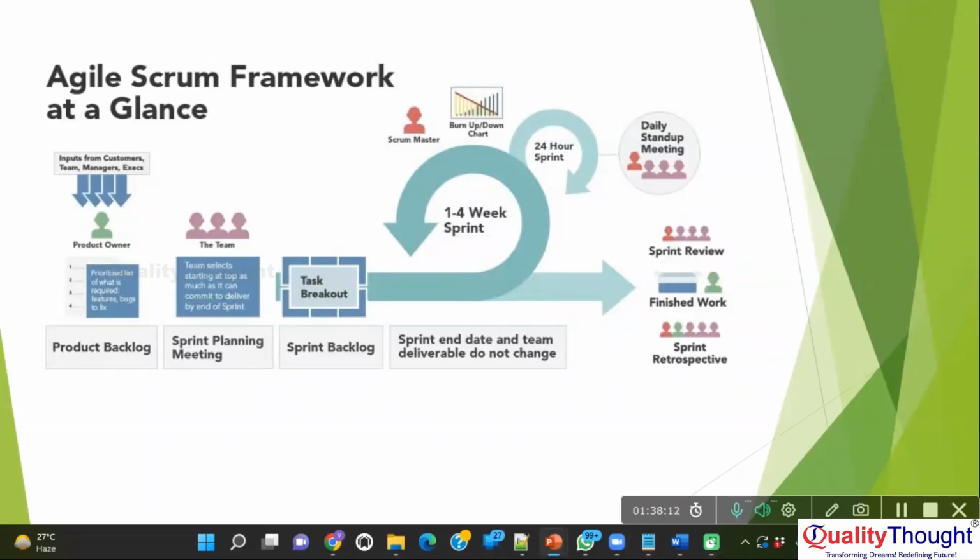Can you think and tell me what the sprint contains? What happens in the sprint planning meeting? Discussion for the backlogs. So this meeting generally happens at the beginning of the sprint. Generally, this meeting would be for 1 or 2 hours, not more than that. Basically, the purpose of the sprint planning meeting is what requirements we have to pull from the product backlog into the current sprint.